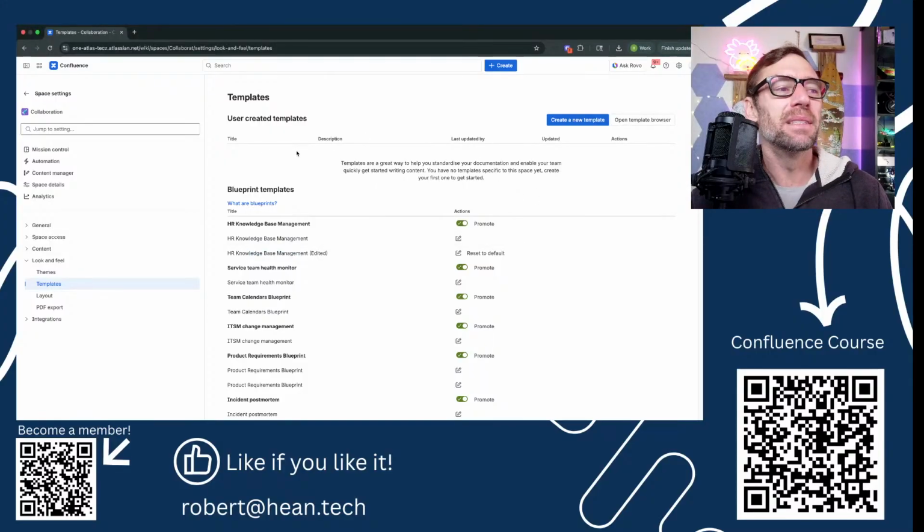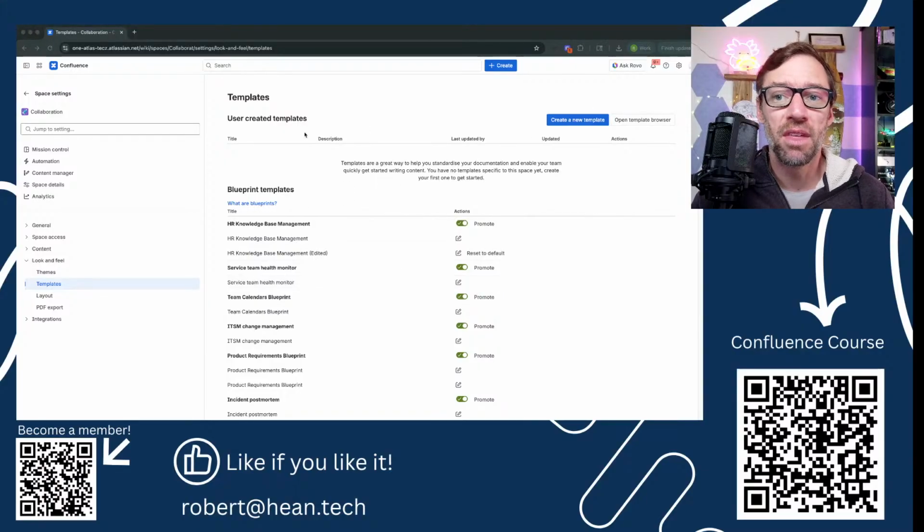So these are our templates. Again, really important that we take a moment to go update them. I typically will take a look at templates when I first make the space, just to make sure that they're there. And then on a regular basis, maybe every major project milestone, I'll go in and just ask the team, hey, how do you find the templates? Are you using them effectively? What challenges or questions do you have?